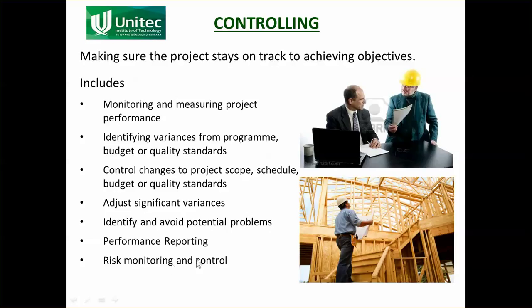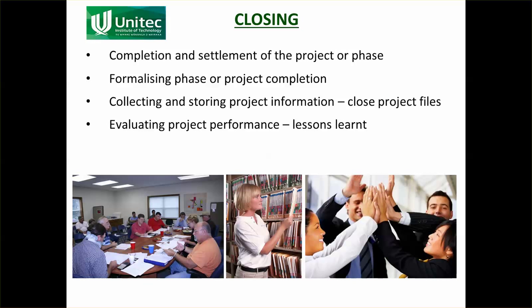And you're also looking at risks. What can go wrong? What can stop us from achieving our objectives of time and budget and quality? And what can we do to prevent those events happening? So for example, it may be that one risk is that the workmen don't construct the concrete slab properly and you have to rip it out and do it again. So you'll be checking to make sure that the concrete slab has been constructed properly to avoid having to actually rip it out.